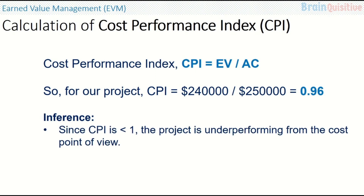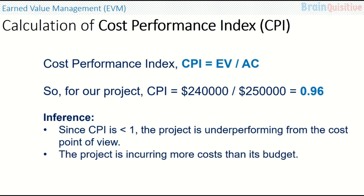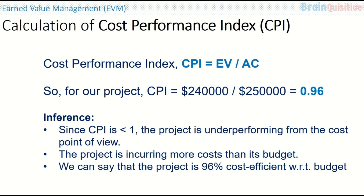Since the CPI value is less than 1, the project is underperforming from the cost point of view. If it is 1 then it is on track, and if it is greater than 1 then the project is outperforming from the cost point of view. The project is incurring more cost than its budget. We can say the project is 96% cost efficient with respect to the budget.